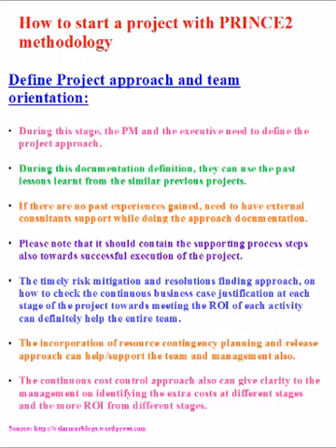Let us say you have different activities or stages. At one activity it might be costing more because of the unavailability of the people. You hire at the 11th hour by paying more money, more salary for the resource, and automatically the cost is increased. Now you are in excess cost. There is another activity where you are going to save, and that savings can offset this costly activity. So such things on ROI you need to measure under P&L, profit and loss balancing.